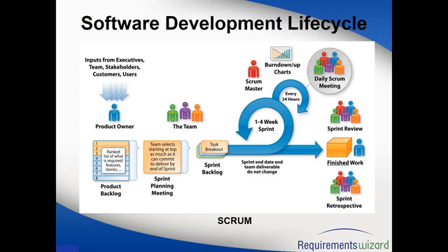See, the biggest advantage here is you are getting the review of the product or the system you are building. You are getting the feedback immediately from your customer. See here, the sprint review is another ceremony which is very important. What will happen in this ceremony when you are done with your sprint? Let's suppose you have a 2 week sprint now instead of 1 week. At the end of the second week, you will show your system to your product owner and tell them to review. Hey, can you please check the system and give me the feedback. So instead of showing them the documentation and the use cases, FRD, BRD, you are showing them the real system now.